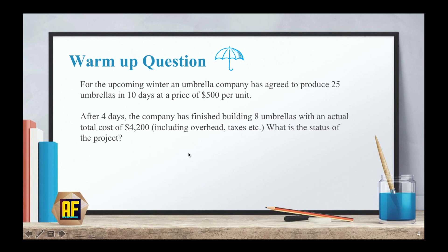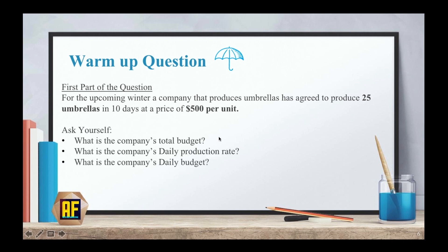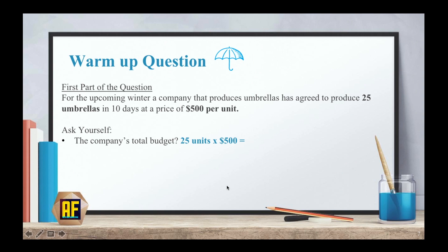By solving this question, this will help you better understand how we actually generate the EV, PV, and AC that we talked about in the previous video. Let's analyze the first part of the question. The company produces 25 umbrellas in 10 days at a price of $500 per unit. Ask yourself: what is the company's total budget, daily production rate, and daily budget? The company's total budget is 25 units times $500 per unit, which equals $12,500.